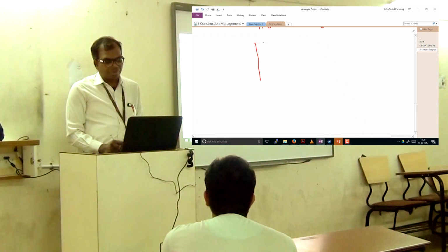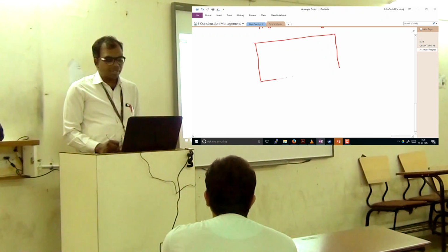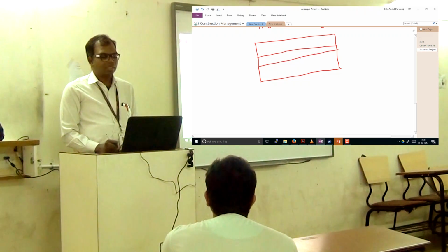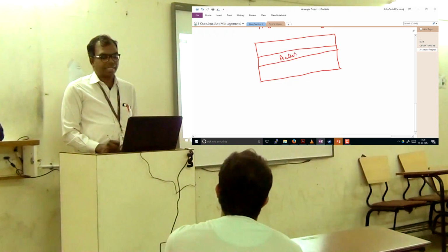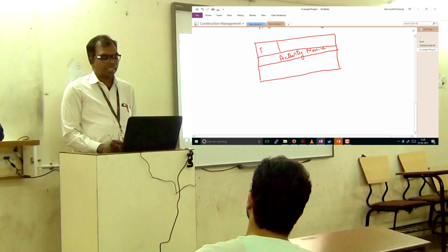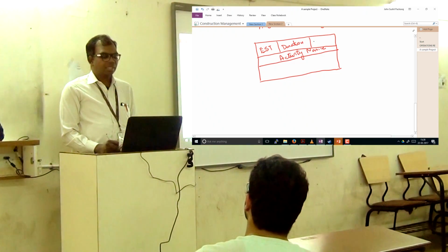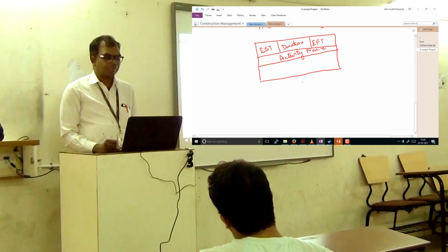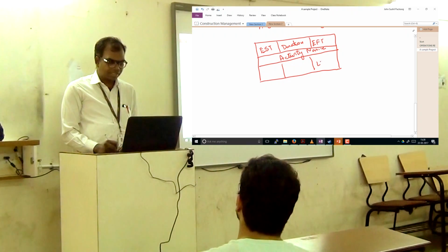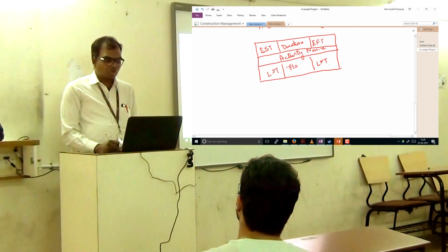Typically, I prefer that the activity on node is made on a box like this. So here you will give the activity name. Then we have the early start time, EST. Here usually you put the duration. Then here you got the early finish time. Then again you got another thing. Here you got the late finish time, late start time. Then you got what is known as the float.